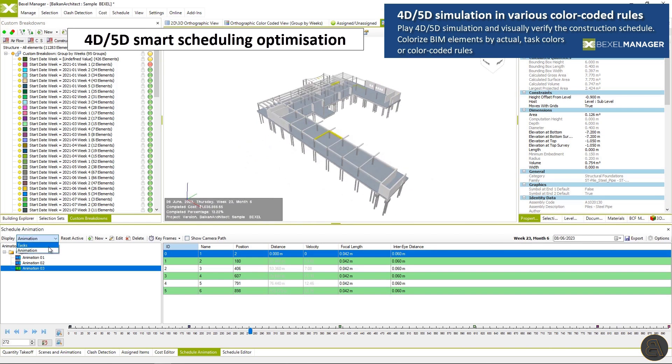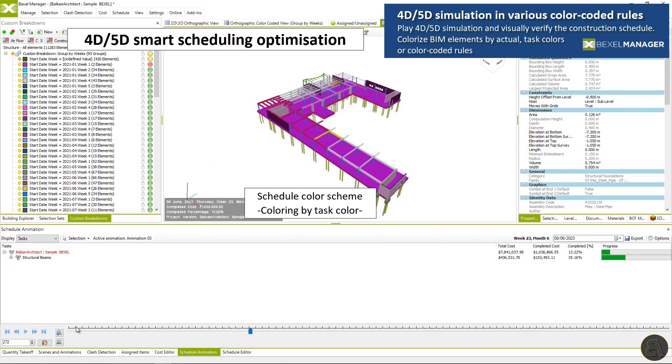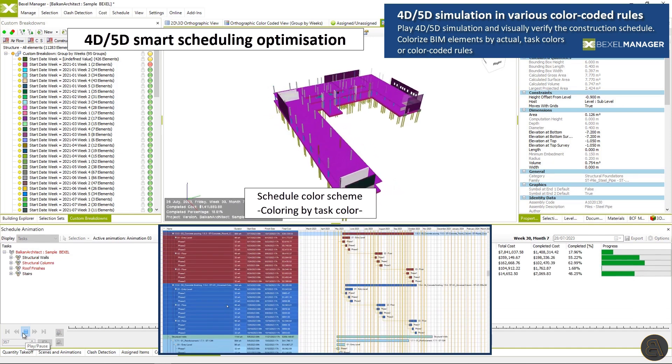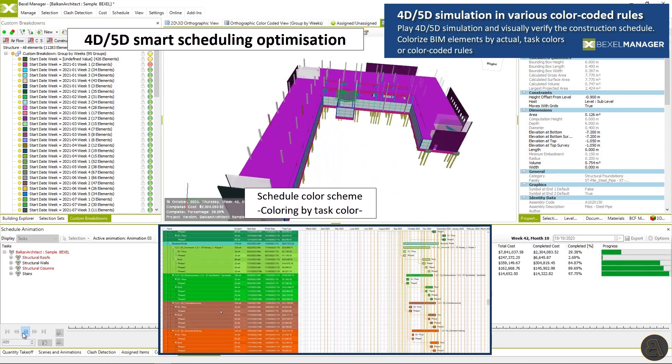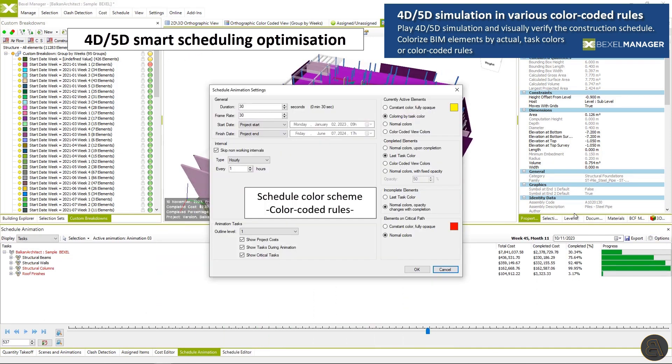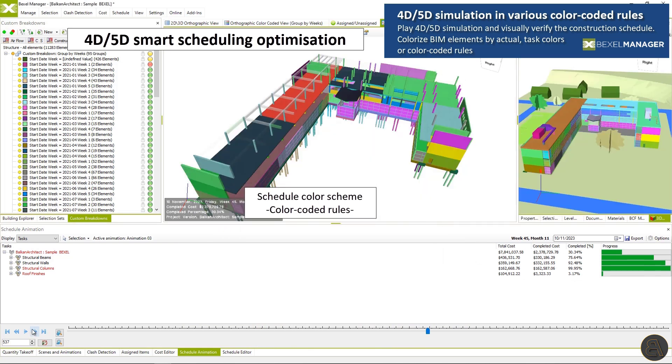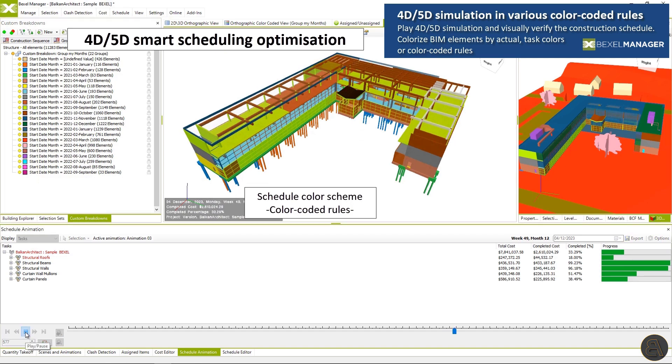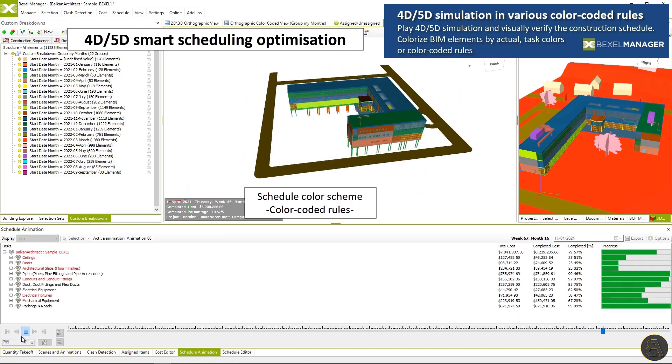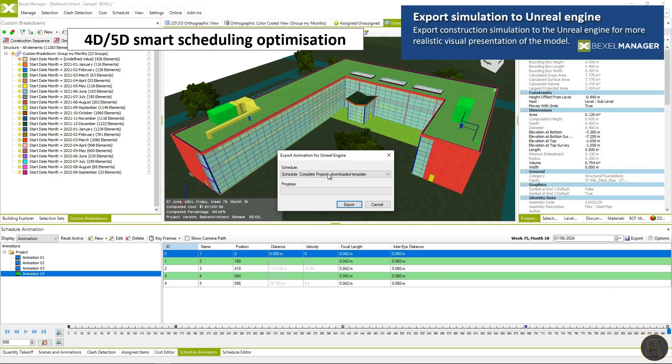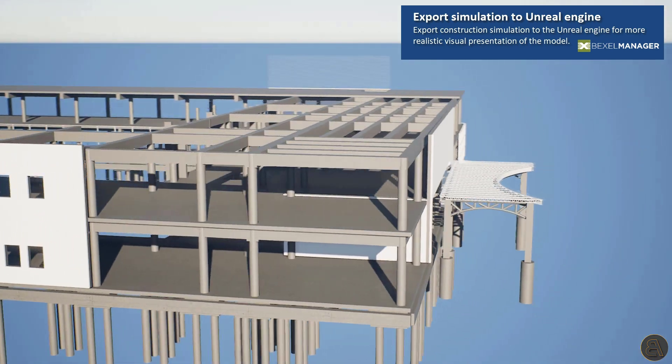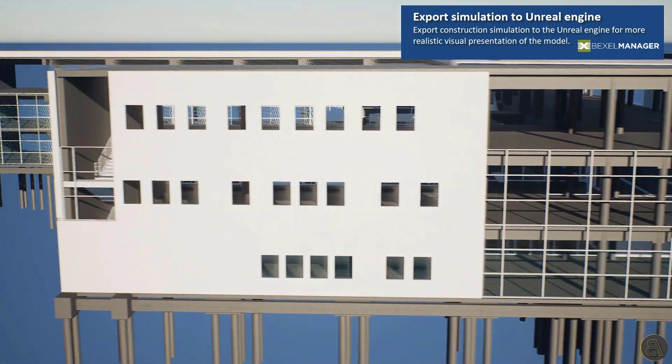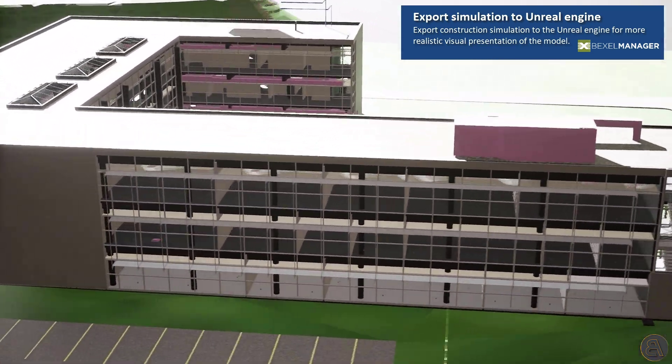Play 4D or 5D simulation and visually verify the construction schedule. Colorize BIM elements by actual task colors or color coded rules. Task coloring system can be defined by task property values, used methodology or link rules. Export construction simulation to Unreal Engine for more realistic visual presentation of the model.